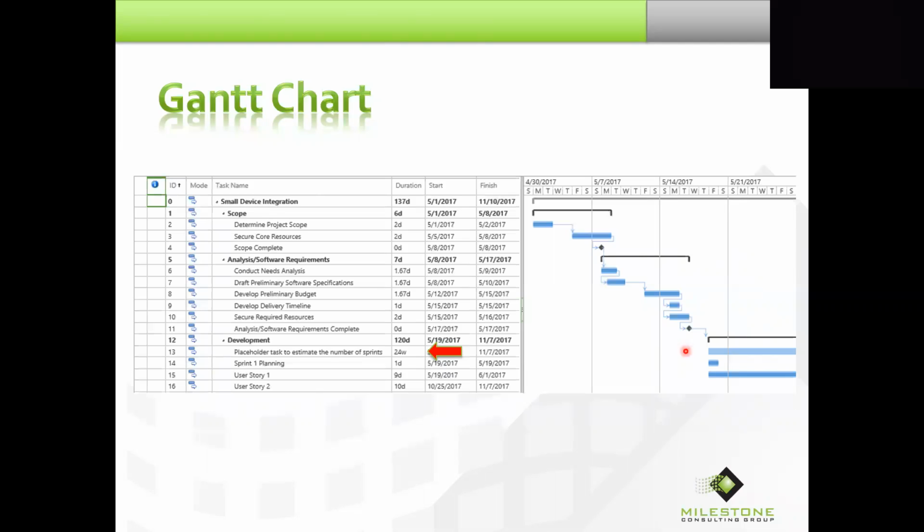If you're in an organization in which you absolutely cannot link summary tasks, that's fine. Link it to the placeholder task. It'll give you the same results. And it'll certainly meet your organization's standards, whatever the PMO has specified.